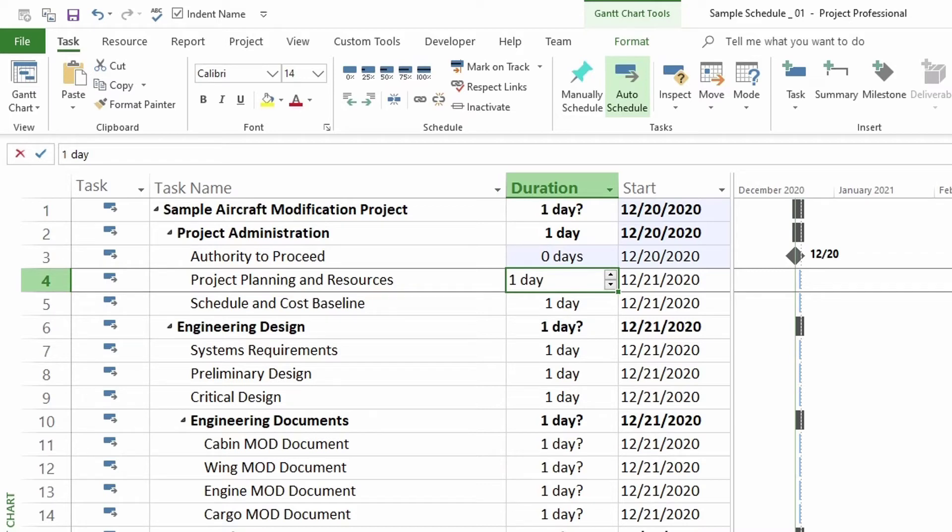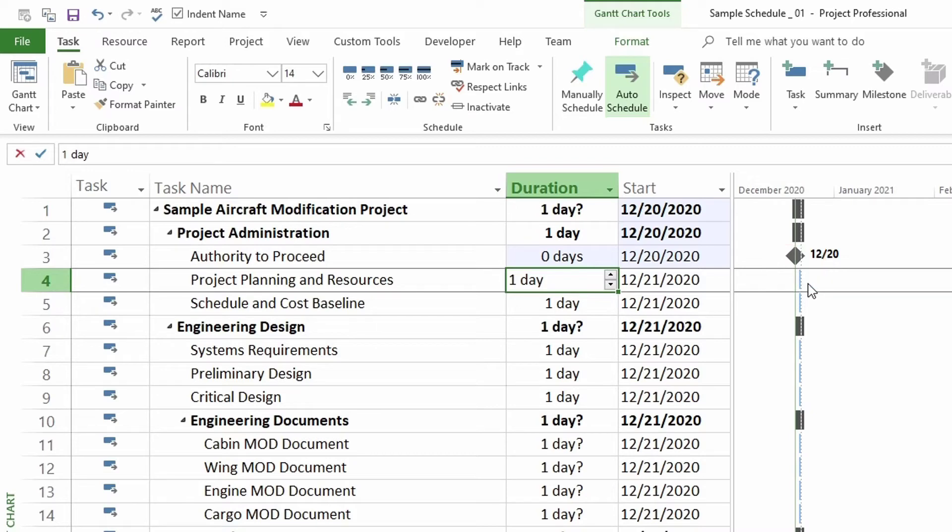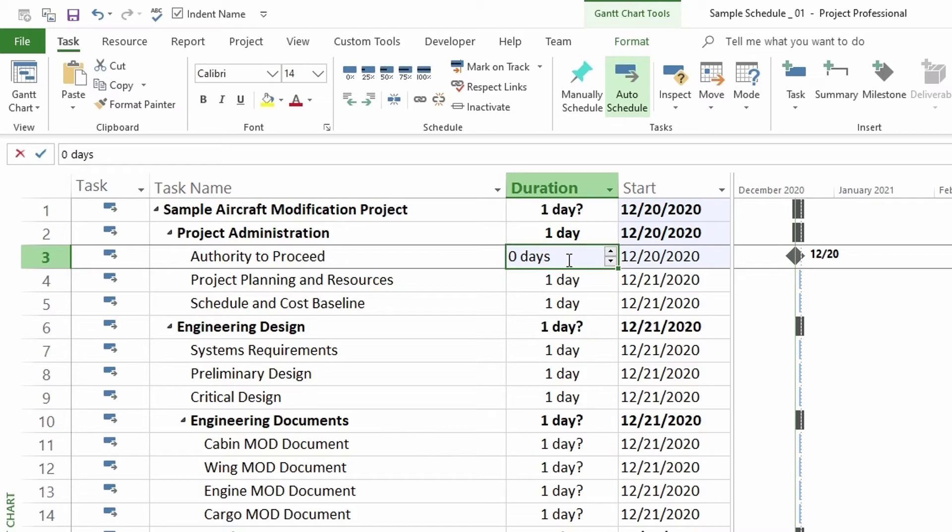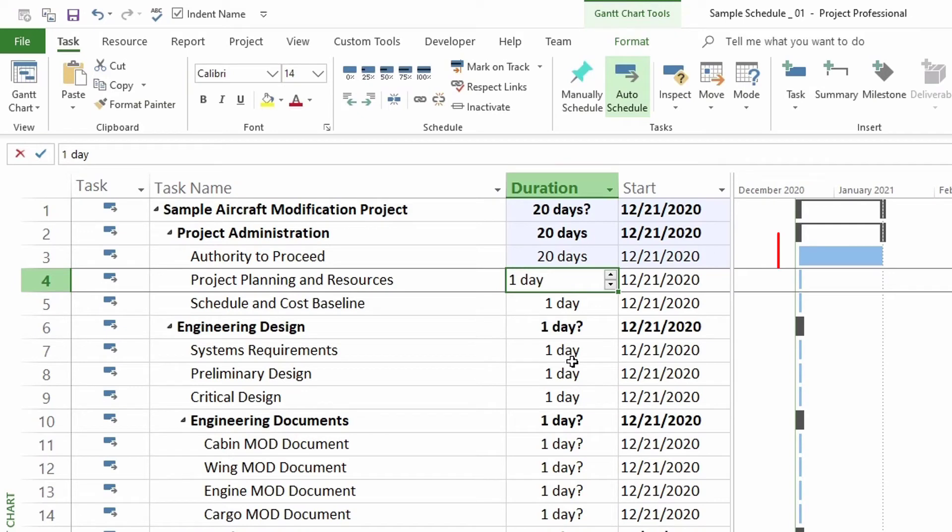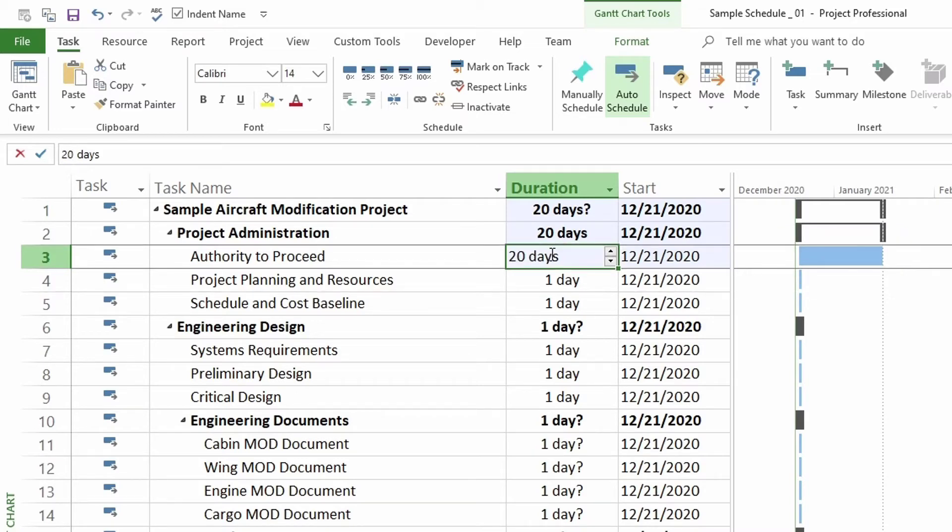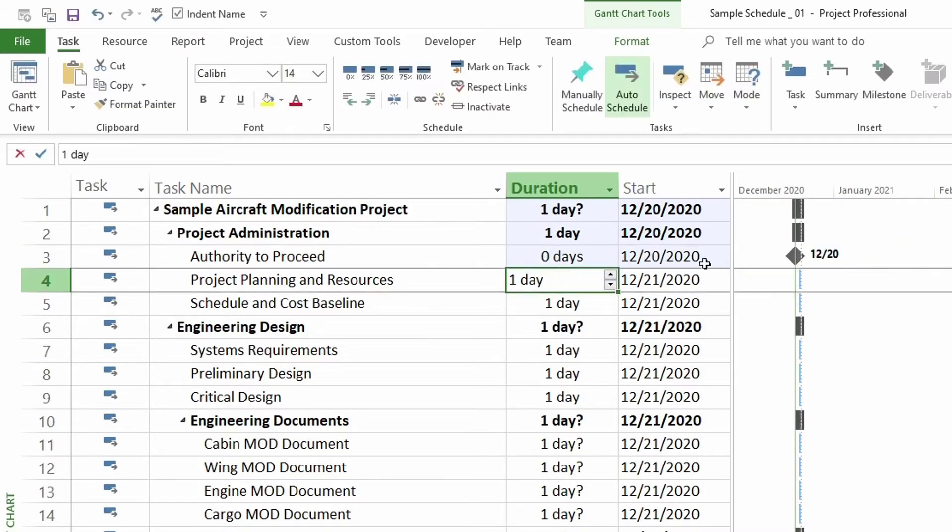But how do you know it's a milestone? Well, first you can start by looking at your Gantt chart. Here you can notice that the small bar I had changed to a diamond. A diamond shape as default in Microsoft Project means a milestone. Let's change it back to say 20 days. Notice how it changed to a bar. Now let's enter zero again. Now we're back to the diamond.